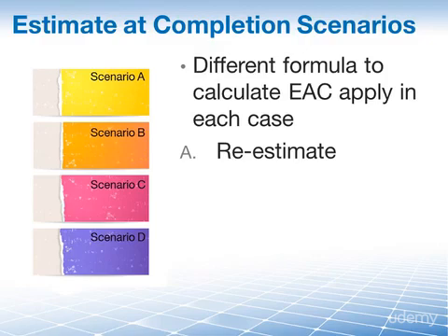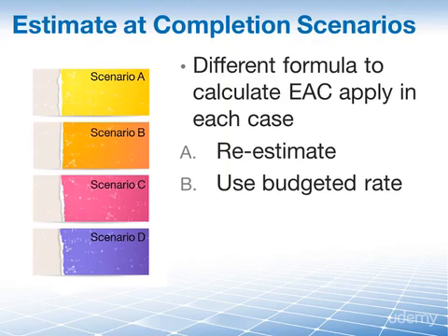Perhaps the assumptions on which the original estimates were based no longer apply, or the original estimates were fundamentally flawed, perhaps due to poor estimation techniques. No matter what the reason, experts want to discard the old estimates and create a new one. Scenario B, then, under this situation, you want to use the planned rate, as you deem that the original budget